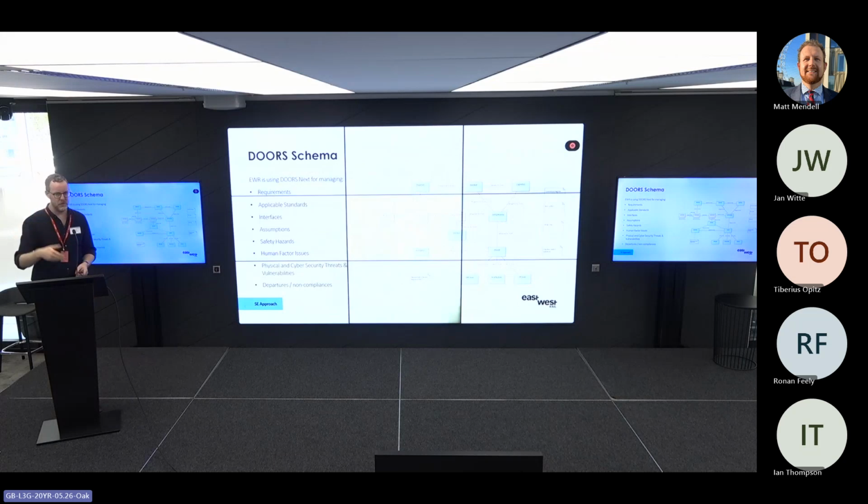Okay, all right. I mean, so we have to come under what's known as CSM, which is the Common Safety Method. So it's a process that applies all across the whole of the EU as to how we demonstrate that a railway is safe to operate. Very heavily regulated process. So we have to go through what's called a hazard identification, and we identify our hazards, and then we mitigate them, and a lot of that mitigation will be through codes of practice and standards and stuff. So we say there's a standard over here, and that covers the hazard.